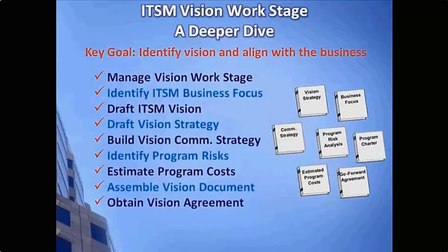Here's the key steps within our vision step. Manage the vision work stage, identify our business focus, draft our vision, our strategy, our communication strategy, look at some risks, program costs, assemble the vision document, and obtain a vision agreement.